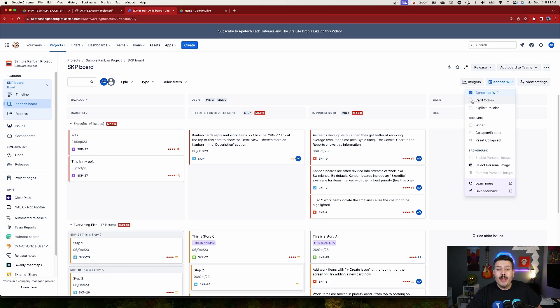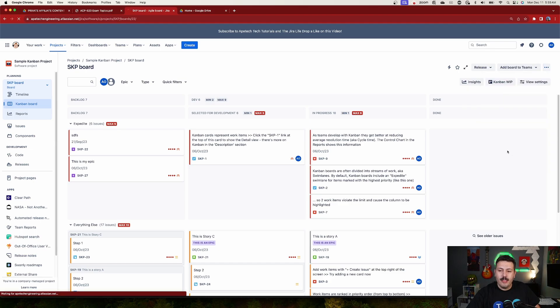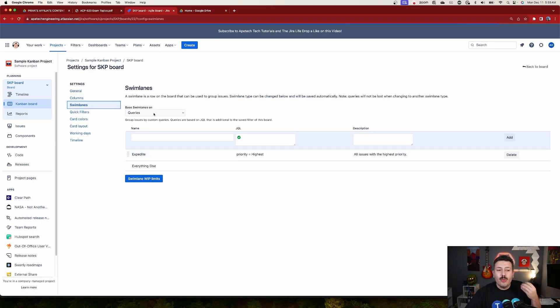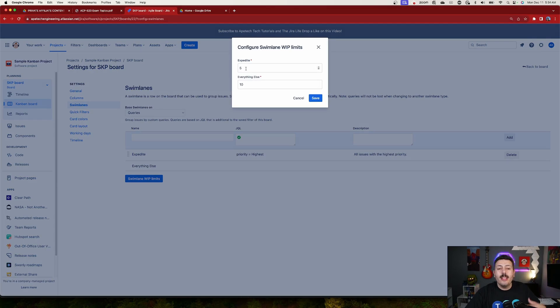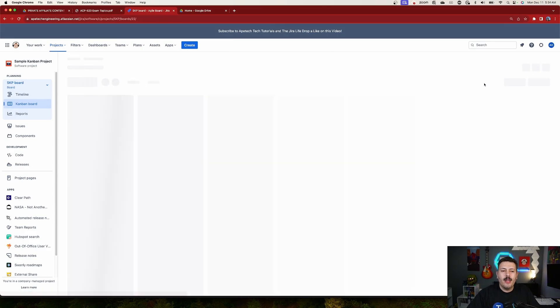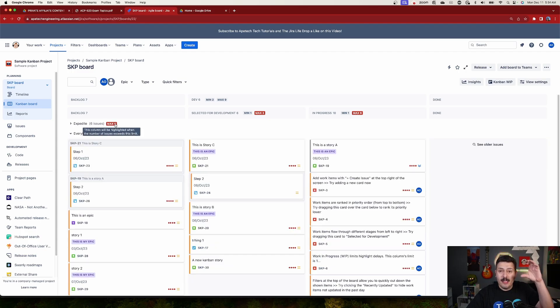Another feature I really like is adding card colors based on swim lanes. Go to your board settings, then Swim Lanes. If you pick the 'Queries' swim lane type, you'll now have swim lane WIP limits — something that wasn't possible before. You can create custom swim lanes based on queries and set WIP limits on those as well. Once swim lane limits are saved, you'll see, for example, a max of five for 'Expedite' and a max of ten for all other swim lanes.